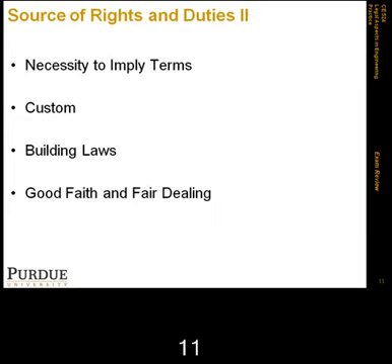Under good faith and fair dealing, parties were not expected to guarantee that other parties receive their expected benefit, but they were expected not to make the other party make unreasonable sacrifices, and also the parties were expected to avoid any deliberate and willful frustration of the other party's expectations.